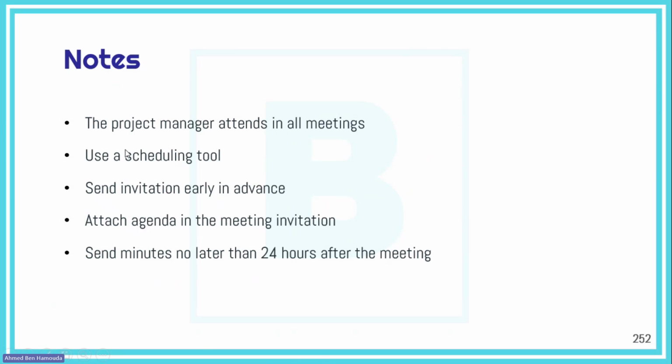Now, if you ask how early should I send the invitation, it really depends. For example, for a customer meeting, I usually send the invitation early in the week. If we will have the meeting on Friday that week, I send out the invitation on Monday, and I attach the agenda in that meeting invite. And then on Wednesday, I contact the key stakeholders to let them know that I've sent out the invitation. Usually, when I send the invitation, I make sure that I receive notifications about the responses of the attendees.